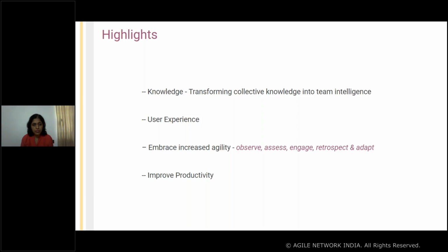Then improve productivity. There are n number of ways you can improve your productivity. One is meetings. When you have your daily stand up or scrum, make sure that it doesn't go beyond 10 minutes. At max 15 minutes, not more than that. I used to strictly follow that. And if there is anything which needs more detailed discussion, I made sure the teams have a separate discussion on that and not waste everyone's time, right? So that is one thing.